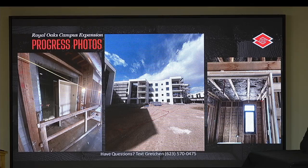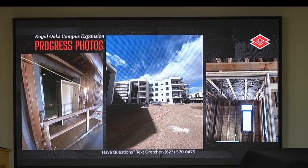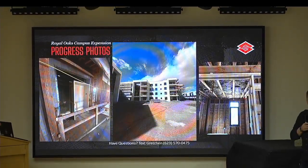So this elevator is pretty exciting to me because we've been working on this thing for a long, long time. These other elevators that are 3 and 4 stops, they go pretty quick. They go in super simple. They're a 2-week install, and they don't really take long to get the components installed once they're on site. This was a long burn time to get early lead products on the job site, and then sit there and wait till the rest of the construction caught up.